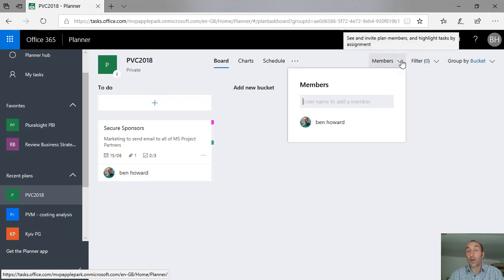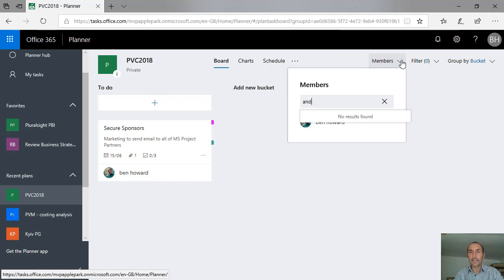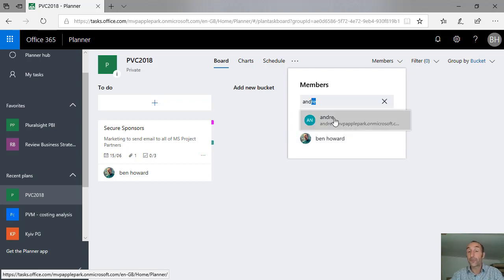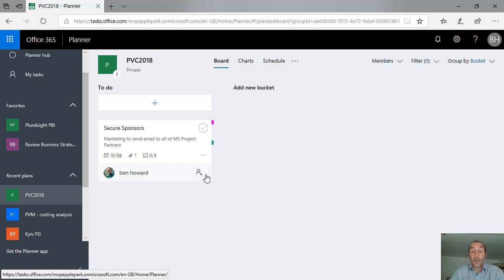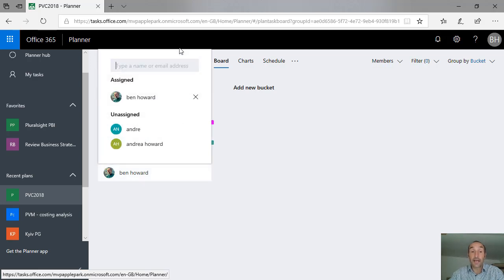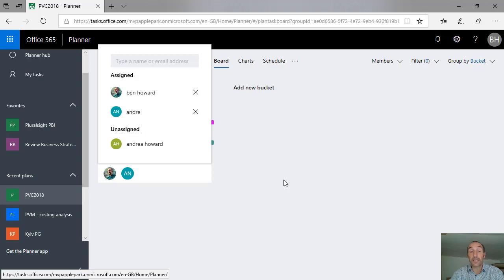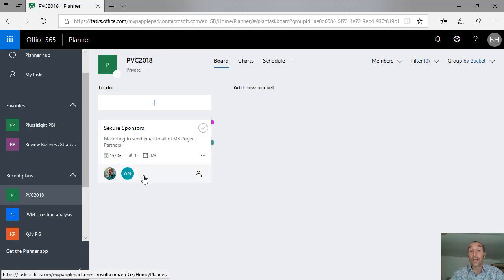Okay, so that gives you a good idea of what we could do just for a single activity. I can also go and add some members. So I've got some users obviously in my Planner environment. So let's just begin to type. I've got 2 other users, Andre and Andrea Howard. So I'm going to add them both to my Project Virtual Conference 2018 plan. So when I do that, I'm also then able to assign this task to multiple people. So if I think I want both Andre and myself to do this task, then we can do that. So we have multiple assignments.